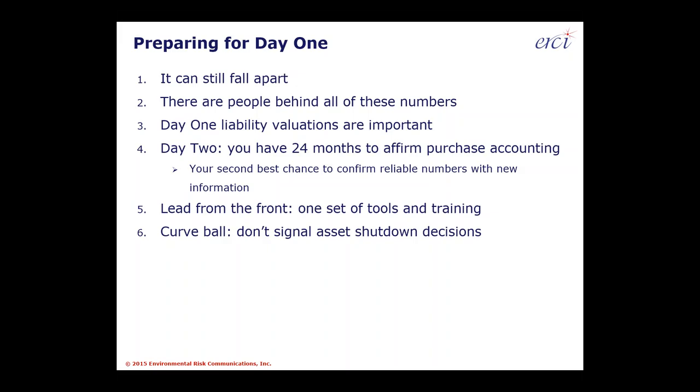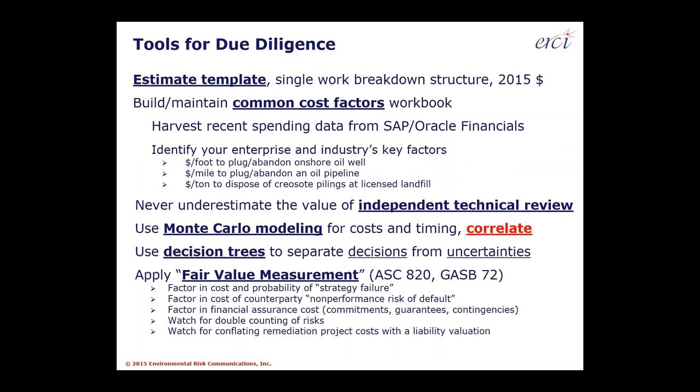Final curveball: don't signal any asset shutdown decisions. The tools we see as useful include using an estimate template — a single work breakdown structure, a comprehensive one based on 2015 US dollars, used for all sites undergoing due diligence. Second — vital — maintain a common cost factors workbook, harvesting data from your enterprise cost accounting system such as SAP, Oracle Financials, or JD Edwards, and identifying cost factors relevant to your industry.